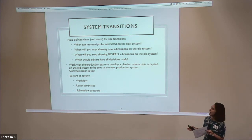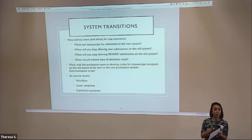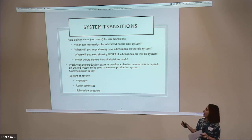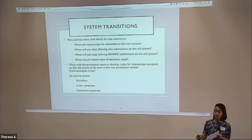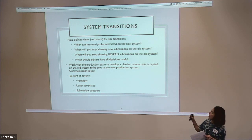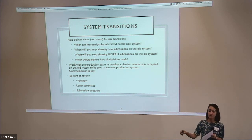If you are switching submission systems, you might need training in that new system. Going back to your timeline, when this transition is going to happen, it will probably occur well before the official transition date — which it should. You need to know how long you'll have access to the old system. Do you lose it on the official transition date? How long can new submissions be submitted to the old system, and when can new submissions go to the new system? Usually that's the same date.